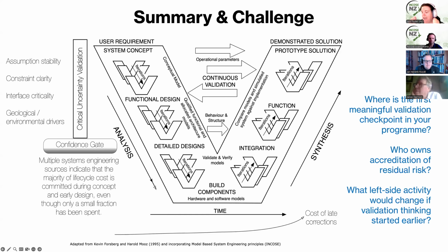Are we looking to see if this thing satisfies its specification, versus are we looking at this thing to determine whether the level of residual risk is acceptable? And instead of doing that at penetration testing at the very end when you had a prototype you could play around with, we did a validation activity at system requirements review.